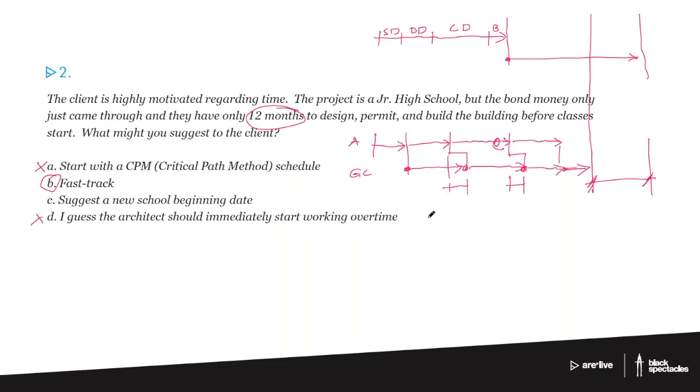Also, it can be very complicated from a permitting standpoint. The permit officials have to be on board, and you have to do a continuous process of reviewing with the permitting officials, so they would see each package of information as it went out to the GC and have their moment to change it or add something to it before the GC could start working on it. So it's very complicated, there's a lot of overlapping elements. Remember that design bid build version up here where we went through the schematic design, the design development, we worked everything out, we got all the details, we bid it out, we know we have a low bid, then we have a contractor and they build. That's so much smarter of a way to go than fast track, but it takes a really long time.